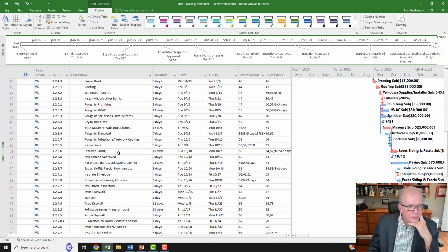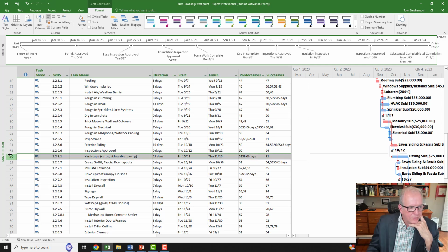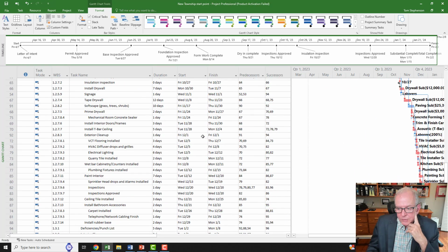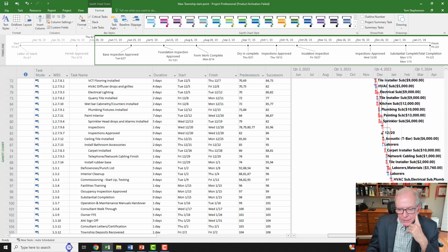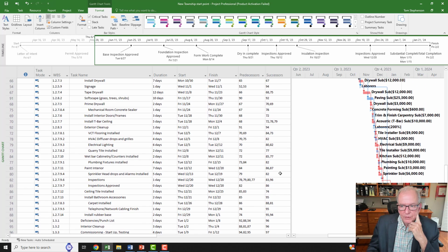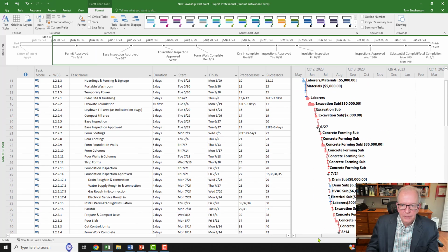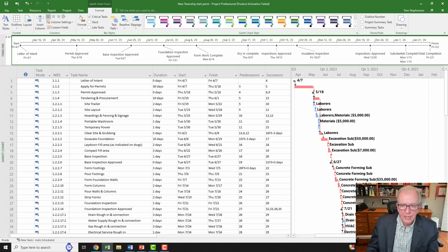Now everything is just in an even order. You don't notice things have changed, but they have quite dramatically changed. Like, look, number 90 is between 61 and 51. It's now organized from the beginning of your project to the end by date. So if you're following it backwards, you can look at it also by what's happening on the project one at a time and by the links. Some of the links still may be up in other spots because there might be lags on them, but you can really follow it by a date timeline, which is very, very helpful in reviewing it. And especially when you're going forward, it's very helpful when you're thinking about what comes next, what's the sequencing.